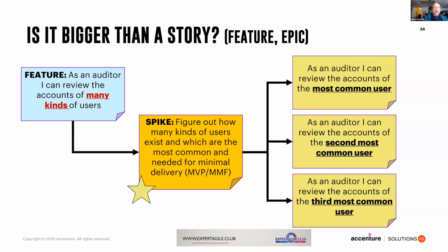Usually when we say increment, we really mean sprint. So it's something that can be done in somewhere between 1 and 3 weeks, a small increment of work that a customer can take advantage of. That's delivered value. So that's one way of splitting the story, which is splitting a big thing down into smaller things. And we use the same logic here.